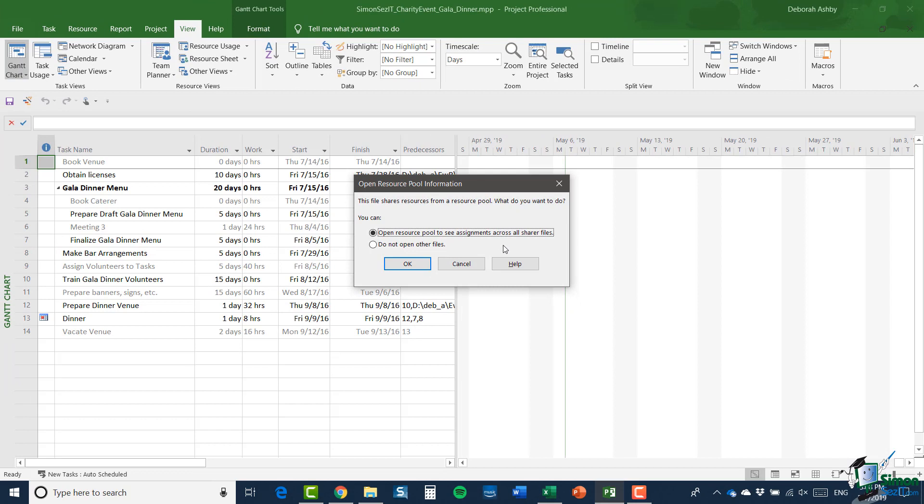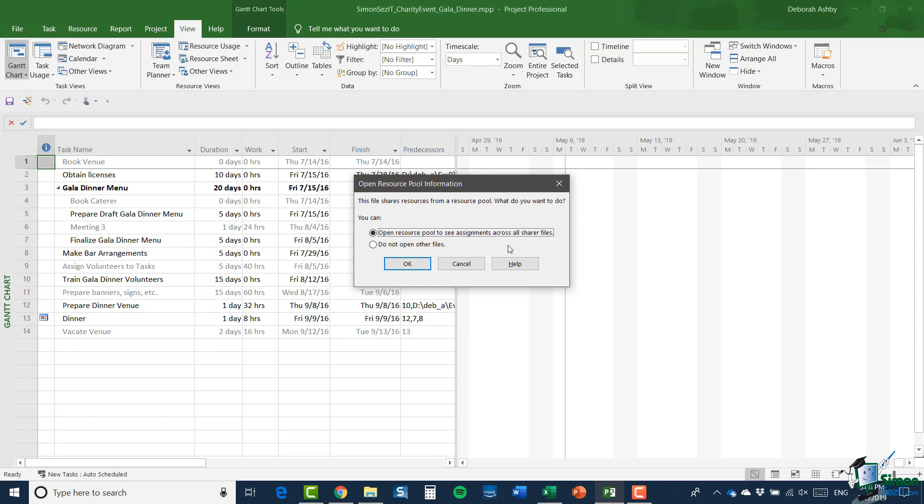Note that I also have in the file behind what is in effect dummy or ghost tasks and these are temporary dummy versions of the tasks to which the tasks in the gala dinner project have dependencies, either predecessors or successors. Now, they're not real tasks but they represent tasks in other sub-projects of all and they are just to give me information about what are to this project external dependencies. Now, on this occasion, I'm going to say open the resource pool to see the assignments across all sharer files and I'm going to click OK.